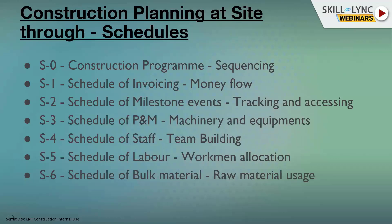Labor is one of the most vital resources because they are the ones who actually get the work done. There has to be a schedule for labor - at what time, how many laborers are required. All this gets derived from every sequence of the construction program. Similarly, there is a schedule for material - how much cement, reinforcement, and formwork is required. Just like the birthday preparation where the mother plans all ingredients of the menu - vegetables purchased in how much quantity depending on whether four or ten friends are coming - this is called material planning. Based on the construction program, you can work out all these requirements.